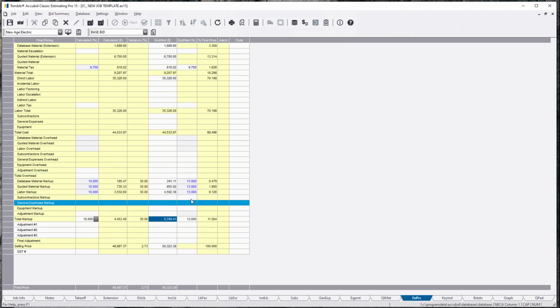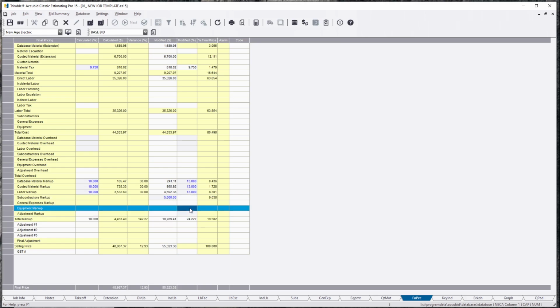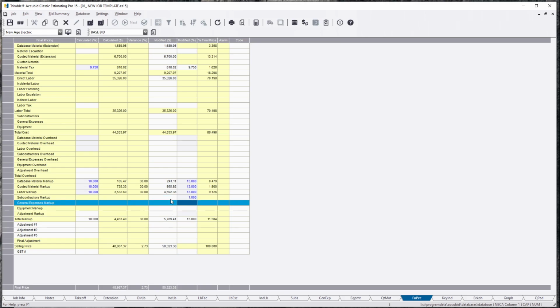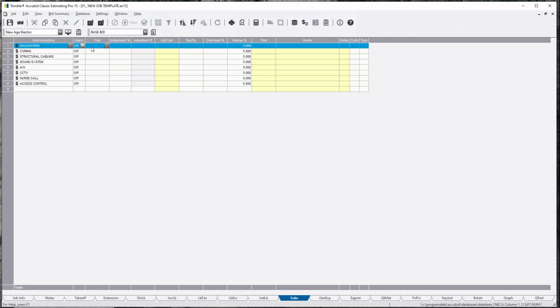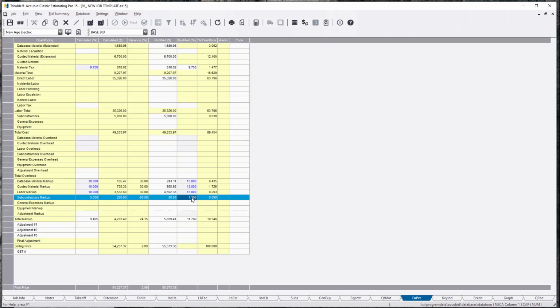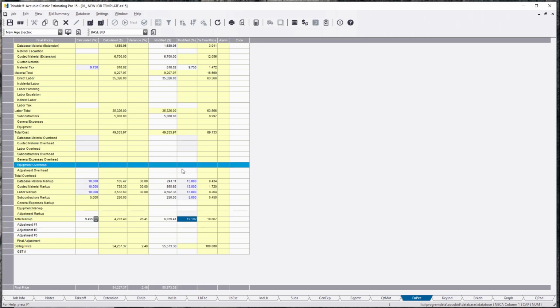So this is going to be a blended rate if you add 5%. So if I had 5 here and there was actually $5,000 worth of material there. Actually, it's a bad example. You can't do that here. So let's do it really quick. Let's just say there was $5,000 here, and we put 5%. Now this is going to be averaging out to a 12%. So keep that in mind.